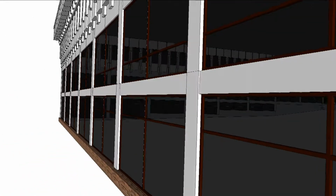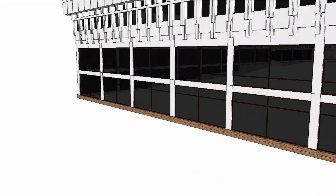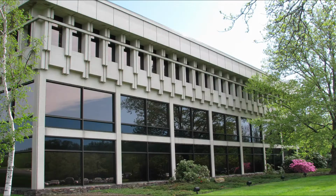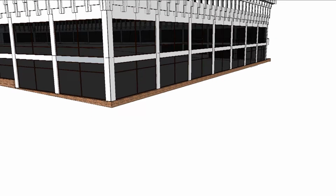The photographs taken for the purpose of the survey will serve to establish the condition of the building and the grounds prior to the restorations project. If the contractor has caused damage to the grounds or the roof or any other portion of the building, these photographs will reveal that condition.